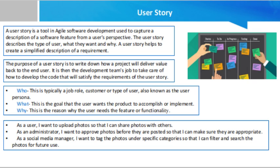This could also include any tests that need to be done to verify a user story. Examples of user stories: as a user, I want to upload photos so that I can share photos with others; as an administrator, I want to approve photos before they are posted so that I can make sure they are appropriate; as a social media manager, I want to tag the photos under specific categories so that I can filter and search photos for future use.